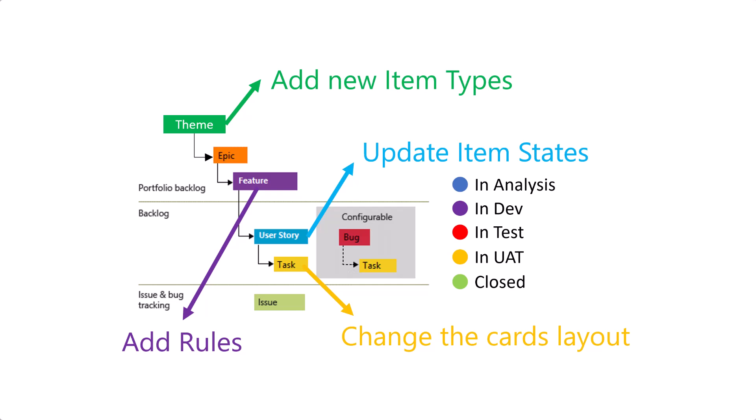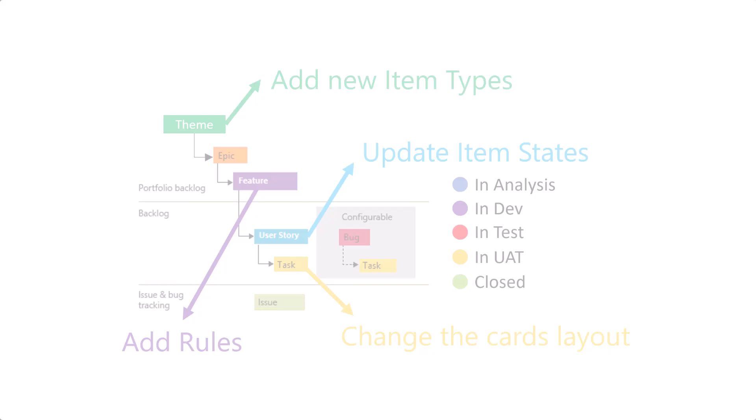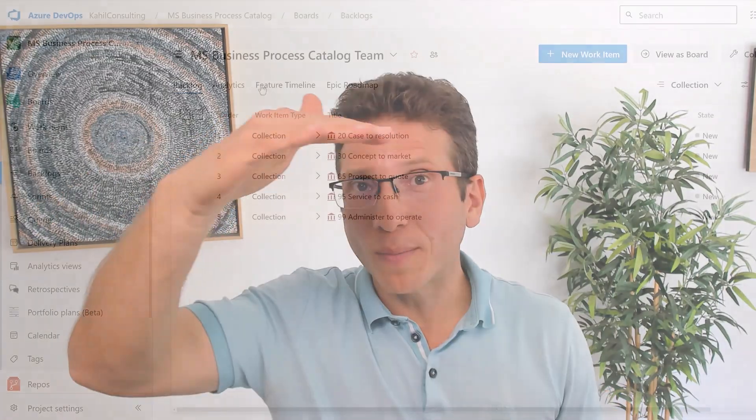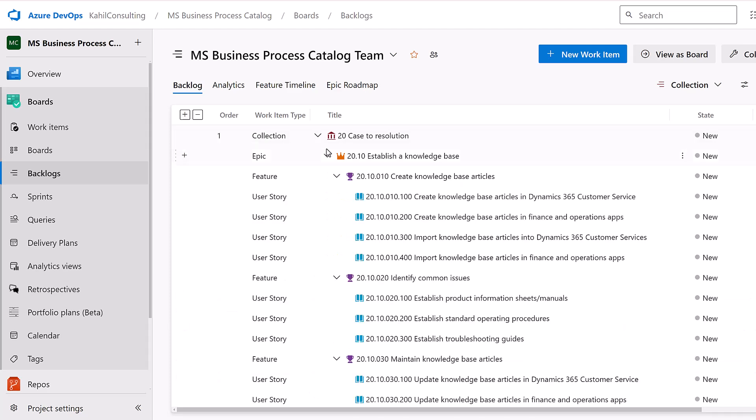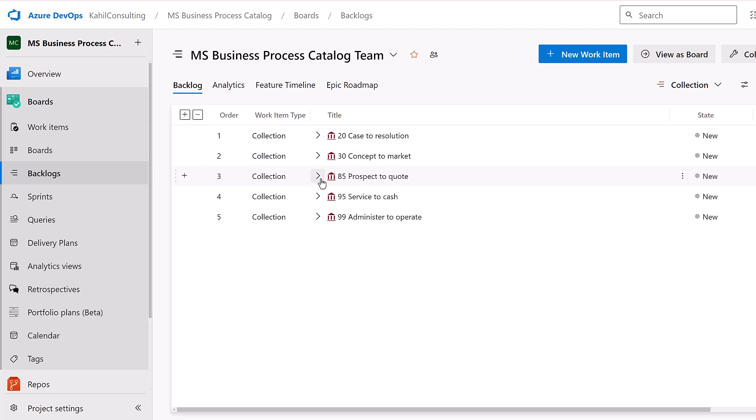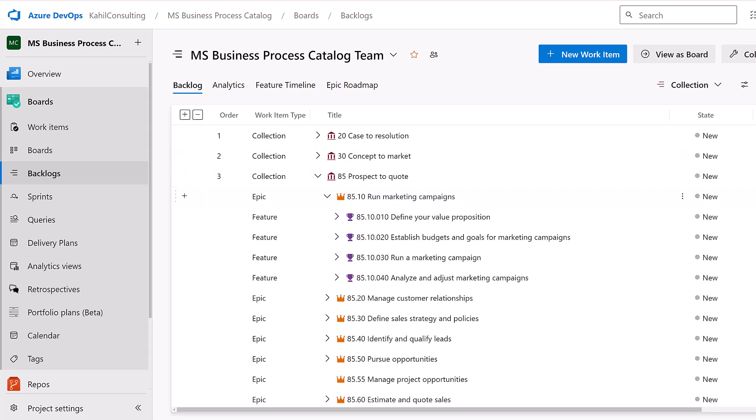I sometimes don't use epics on smaller projects — we only have features and user stories. On bigger projects, I might even add another item on top of epics. You can effectively tweak the structure of your product backlog in Azure DevOps. I have additional videos on my channel showing how to customize the process and add additional work item types. On larger projects, I might have an item on top of an epic called a collection, a team, or a business capability — essentially a grouping of epics. Don't stick to the defaults — use what fits, and Azure DevOps is fairly easily configurable to help your team communicate, collaborate, and deliver great projects.